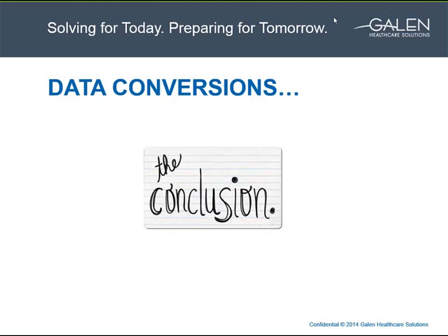Well, Erin had a slide that she shared where she outlined the methodology: unit testing, small scale, large scale, full scale, and a lot of variability in there from client to client as to how that's defined. But I would just say, and Erin, feel free to jump in here, unit testing, we're really looking to validate one of each data type coming over. So that's the goal there, making sure that everything that has been mapped is able to convert successfully.